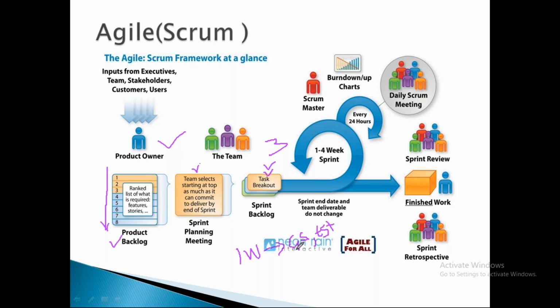A grooming session is a discussion about that user story. Suppose in the first sprint I have 10 user stories. We should understand all the 10 user stories, right? So we'll discuss what story 1 is, what story 2 is, what story 3 is, and how much time it will take to design, develop, and test. We will plan, right? Is it taking 1 day, 2 days, 3 days? Story 1, let's say 2 days. Story 2, let's say 1 day. Story 3, okay, 3 days. Story 4, 3 days. Like that we will plan.